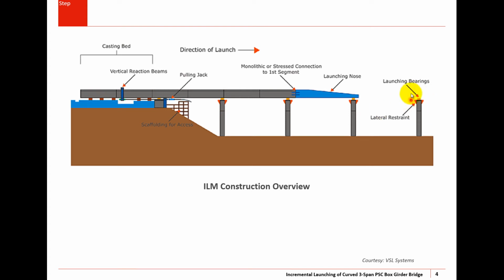So you can see the launching bearings over here. These launching bearings would be used in the launching process and would be replaced with the permanent bearings after the launching process has been completed.